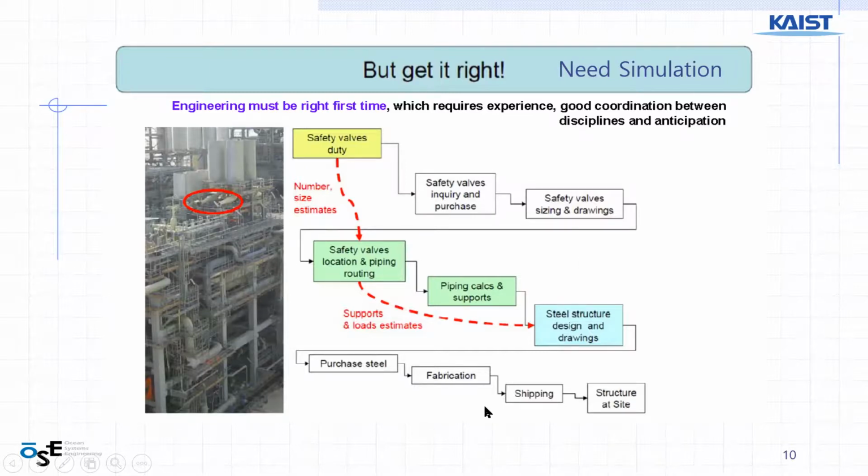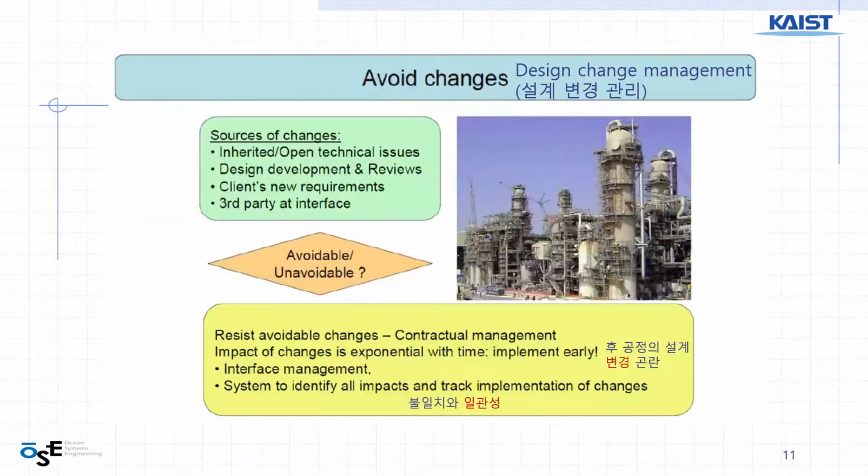And another problem is you need to purchase slightly different pieces of steel and pieces of valves. So that creates a time delay and money spent, high cost. So how can we avoid or reduce the number of changes, design changes? We call this change management.